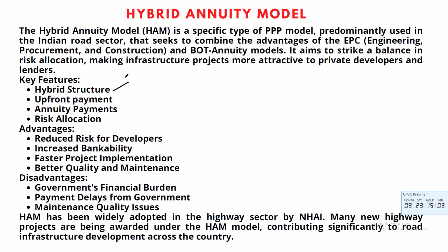Key features. Hybrid structure. It's a mix and match. It's a custom built superhero build. Upfront payments. The government typically contributes 40% of the project cost during construction. Annuity payments. The remaining 60% is paid as semi-annual annuities over 15-20 years after the project is operational.